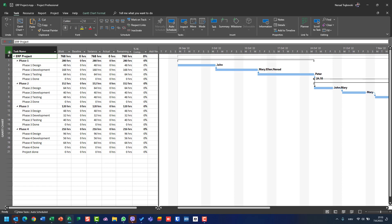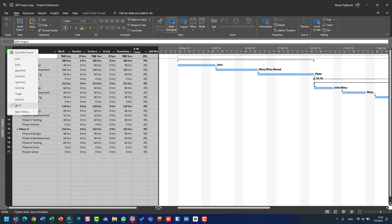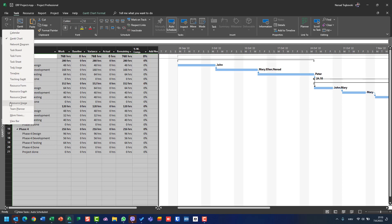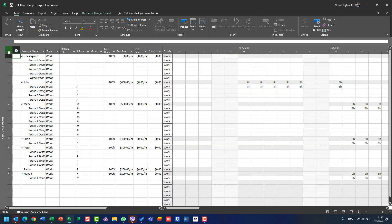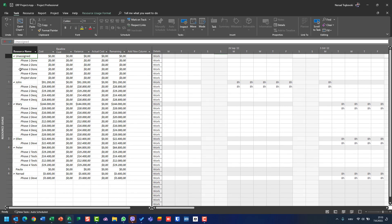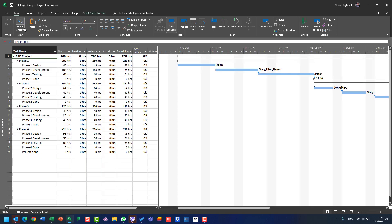I am now looking at Gantt Chart and I chose Work. If I go to Task Usage view or Resource Usage view, I may choose Costs there. I will see costs for each resource in total and for each task under that resource. If I go back to Gantt Chart, I will still be looking at the Work table. So it is not automatic — a table change applies only to the current view.